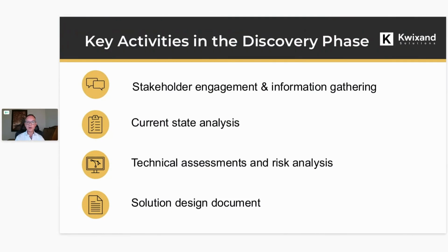We have a formalized process for gathering the information we need throughout the discovery process. We provide a comprehensive list of collateral: chart of accounts, financial reporting, even offline Excel outputs for document formats. We use these outputs in combination with what we learn through the discovery sessions to map a current state. Once that exercise is completed, we transition into a technical assessment. This can include an architecture review, integration and interoperability for a multi-system platform, and technical risks or constraints.